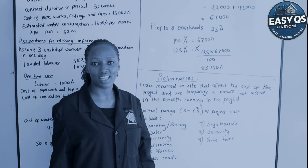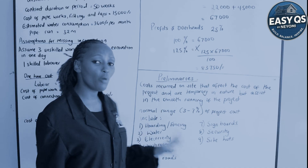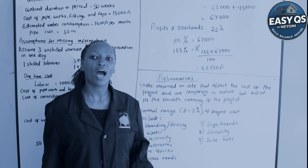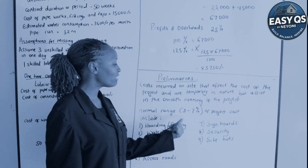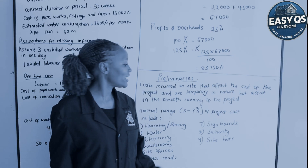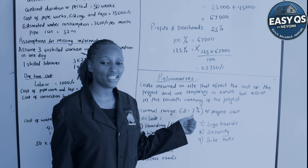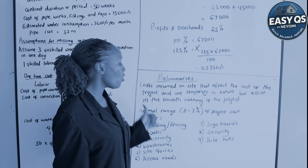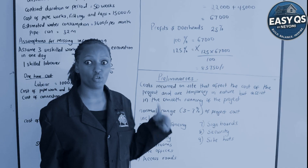These are costs incurred on site that assist in the smooth running of the project. How do you construct a site without water? How do you do a site without electricity? In modern construction, electricity is used extensively. The normal range for preliminaries — if you want a rough estimate — is between three to seven percent of the project costs. If your project costs 10 million, take three to seven percent of that to get the range.